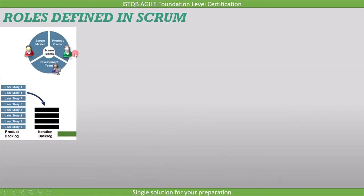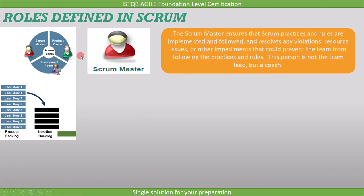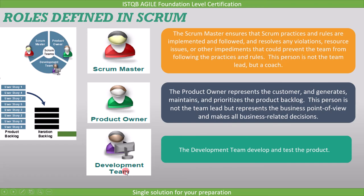Now let's see the roles defined in Scrum. There are three roles: Scrum Master, Product Owner, and Development Team. The Scrum Master ensures that Scrum practices and rules are implemented and followed, and resolves any violations, resource issues, or other impediments that could prevent the team from following the practices and rules. This person is not the team lead, but a coach. The Product Owner represents the customer and generates, maintains, and prioritizes the product backlog. This person is not the team lead, but represents the business point of view and makes all business-related decisions. The Development Team develops and tests the product.